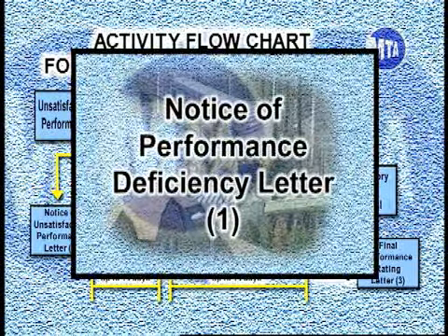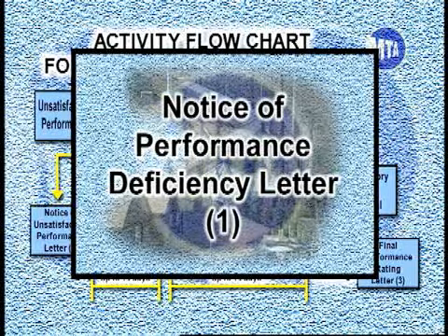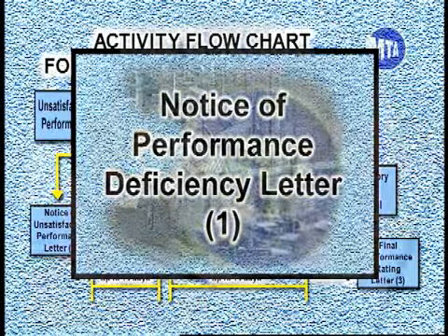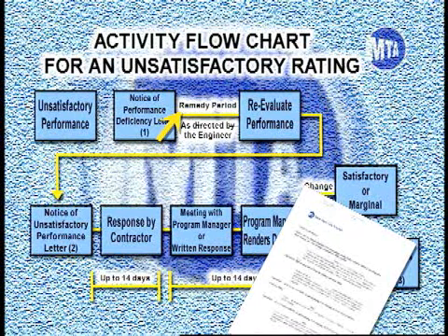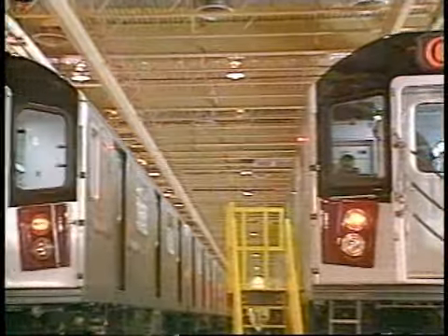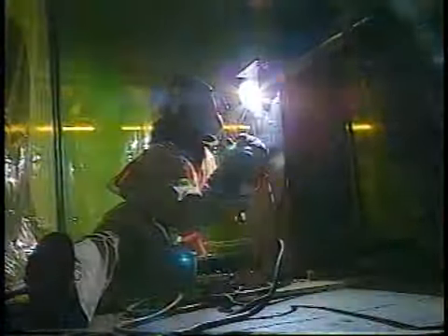Deficiency notice number 1. The notification letter should reference any past deficiency letters as well as any ongoing problems, and it should also include the given remedy period. The contractors and consultants shall also be advised in writing the adverse reaction this information poses toward future awards.